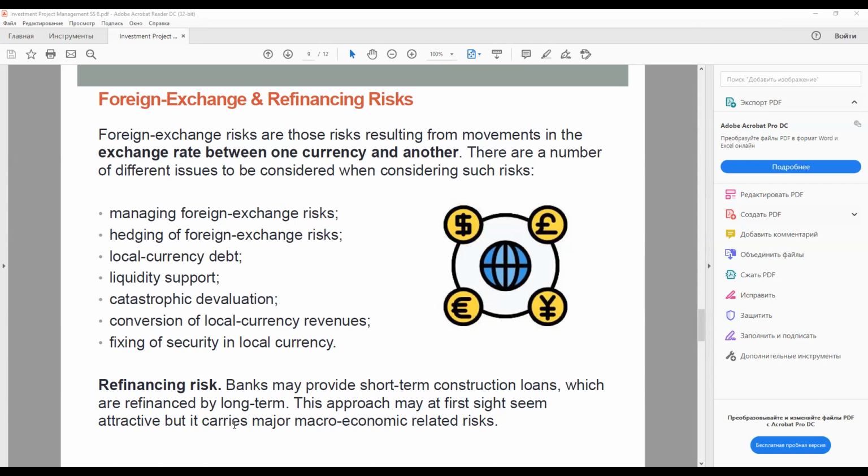So there is a gap between billing and payment, and there is inevitably a gap between the time the project company calculates the amount due from the contracting party, including currency indexation, and the time payment of the bill is made, and it usually can be months or more. The project company is thus exposed to further exchange rate movements at that time, although obviously the risk is limited as only 1 month's payment is involved at any one time.